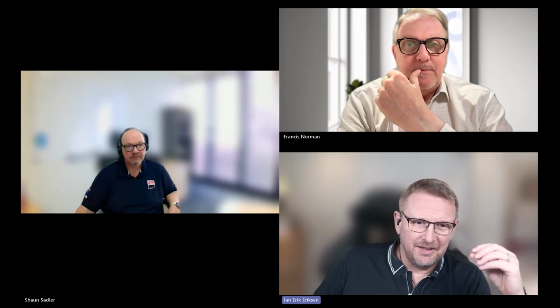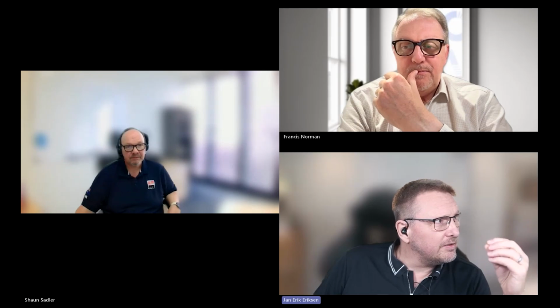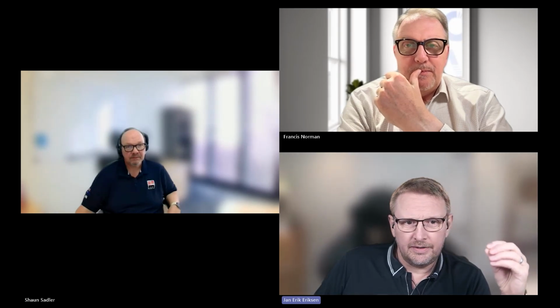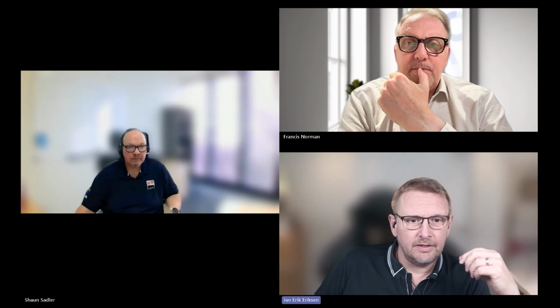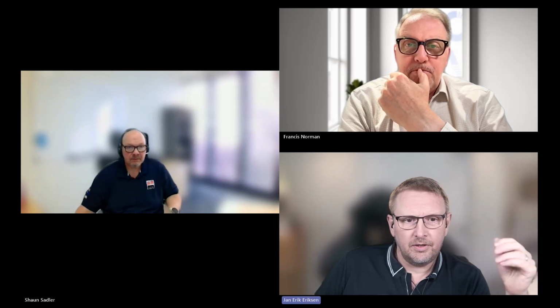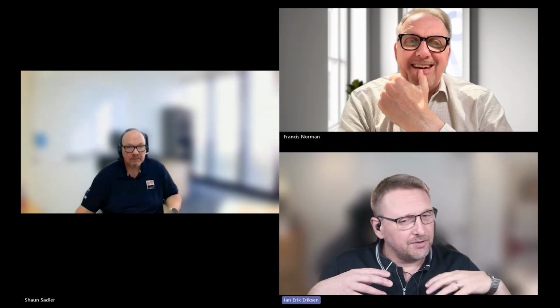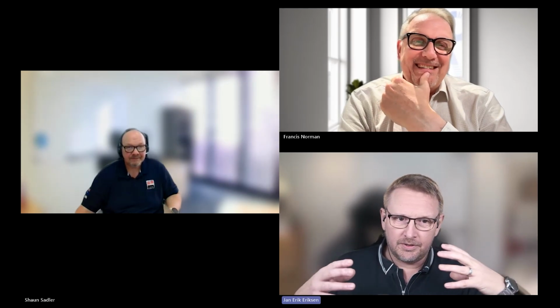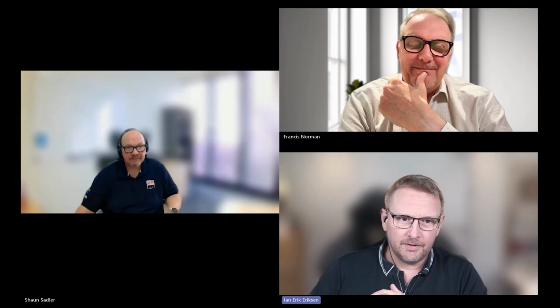It's expensive. We say no floating installations, no FPSO, no semi-sub should be out there for more than 6 to 10 weeks. No reason for that. And you need to have good reasons for it. Otherwise, it should come straight in onshore. All cleaning should be done there. So that's again a different webinar, because we want to change the whole way we are organizing our topside decommissioning, especially for the floating installations. It's not being done very smart for the moment.